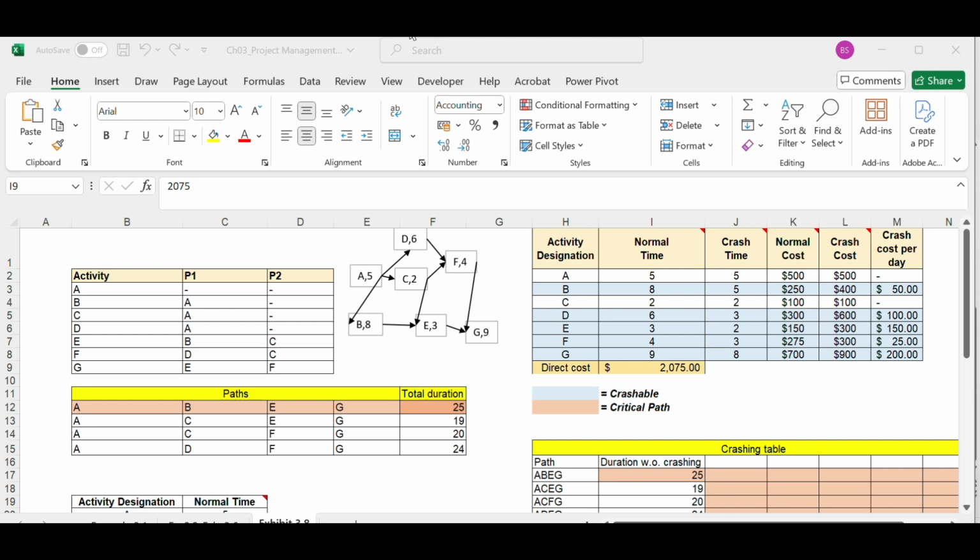After doing any of these techniques, if you are able to bring the critical path back to normalcy, then it's a time constraint project. A time constraint project is when the time is fixed. You might remember, in time constraint projects, we focus on the activity. If you can't compensate the delays on the critical path, then it's a resource constraint project.